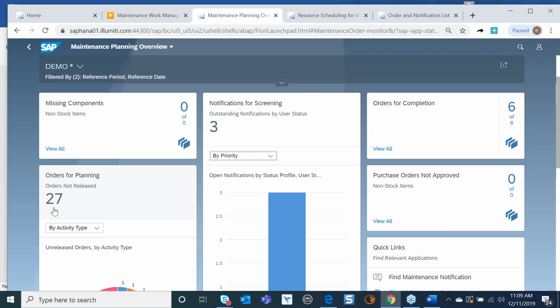And it stays within this card during that planning process. And in real time, this dashboard will also let us know when our materials have been received, when our materials are kitted and ready to go. So at that point, that's when we would release that order from the planning board and move it to our scheduling board. So that's really following a good work management process and saying we're not ready to schedule a job until we know our labor, our outside services, our materials are kitted, and our technicians can just pick those kits up and go. So that increases your wrench time in your plant and really helps the technicians utilize their capacities well.